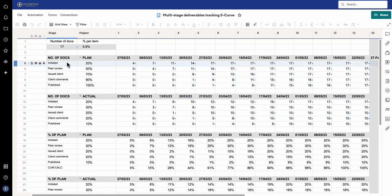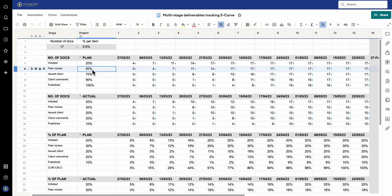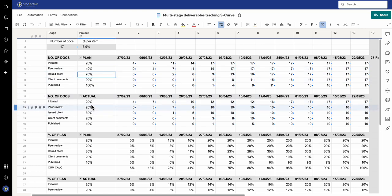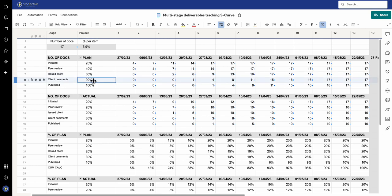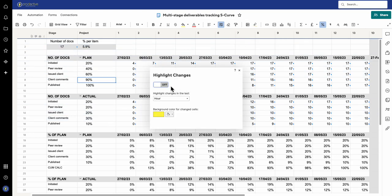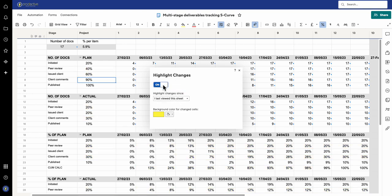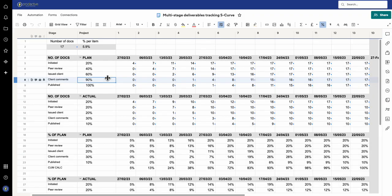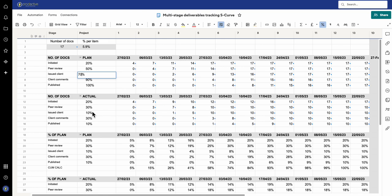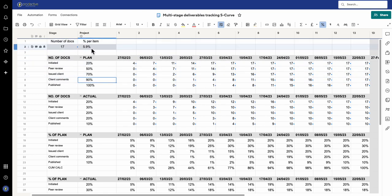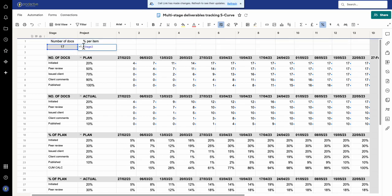So this gives you a relative value as it goes through the various stages of each item. The weighting is really important, and I've got some calculations here so that if I choose to say — well, actually when it gets to this stage it's only 40% complete — then these items down here change in relative terms. So I could change this to be 60%, and then it's still 90% on that bit. You might have seen — let me just turn on track changes — so you can see these are the changes I've just been making. I'm going to turn off track changes and undo those pieces. So that was 50% and that was 70%, and if you just watch down here you'll see that's a 10% change moving it up on the overall piece.